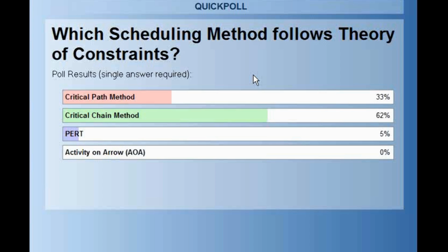When we are working in a predictable environment and we don't want too much management overhead communicating, this is late, this is done, again and again, I am delayed by 1 day so other activity has to adjust, we don't want all those confusions. We try to have predictable activity-based durations so that the people whose activities depend on the previous activities don't remain confused. They have predictable start time and end time.